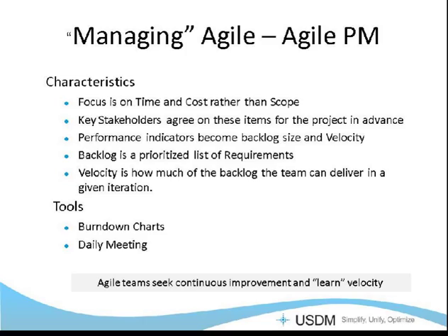But we have this many points, and it essentially draws a line from, let's say a 3-week sprint. You would create a chart that says this is 100 points and we're going to deliver it in 3 weeks. And it draws a straight line from 100 to 0 over that 3-week time frame.